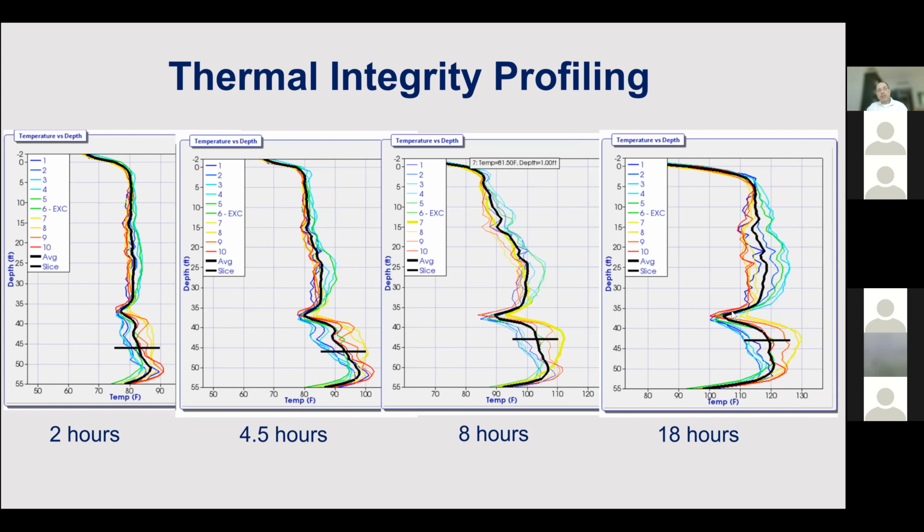The other advantage of detecting the problem early is that it affects the construction sequence. You can alert the contractor to revise his construction sequence. Maybe there's something inherently wrong that is not suitable to the specific site conditions. So he can take action immediately and avoid constructing and having lots of problems along the whole site, instead of just 1 or 2 shafts.